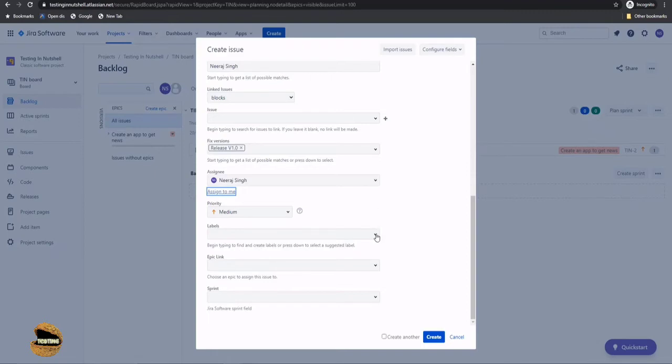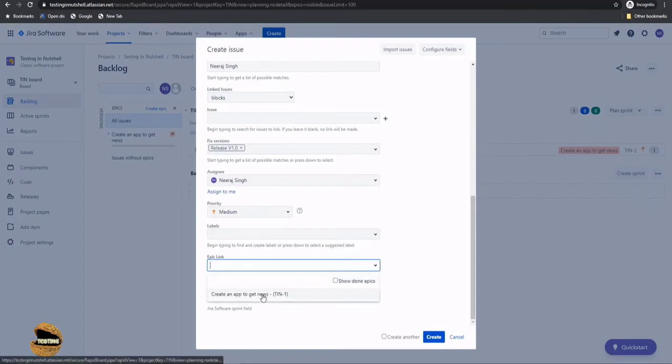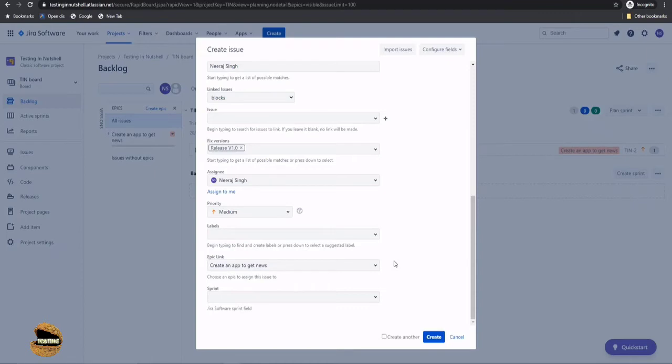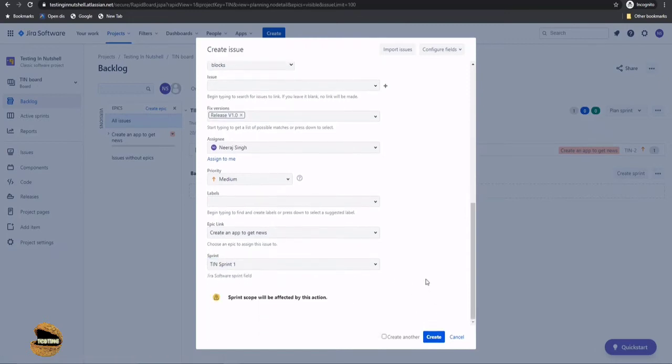Labels, if you have any, you can include them. As of now, we have not created anything. And epic will be definitely important because your user story must fall under a particular epic so that traceability can be performed. And if in case your epic gets modified or changed in future, definitely would require you to have all the necessary linkage in order to see the impact on the test cases. And sprint, of course, your ongoing sprint can be associated with this. And click on create if you don't have anything.